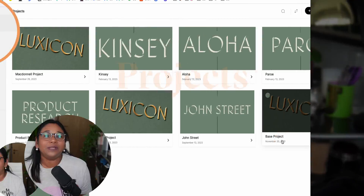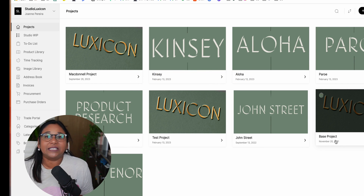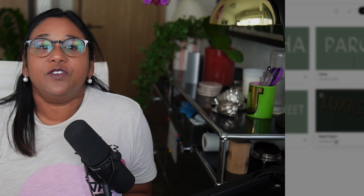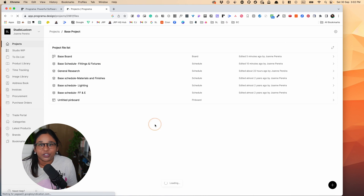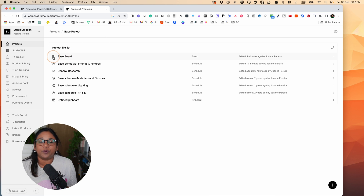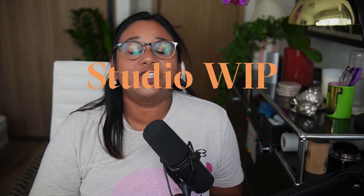Let's head into Programmer and talk about how most designers would use it. You would start in the Projects tab and set up your project here. After using Programmer for some time, I think the best way to start is to create a template for all your projects. If you don't do this, you will find yourself manually entering items and tasks every time you set up a project. Setting up my first project was quite onerous — there was a lot of manual typing. By setting up a base project, you can save yourself time, particularly for similar project types such as residential or office.